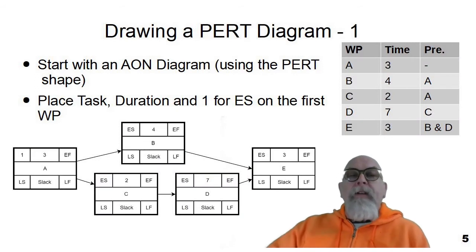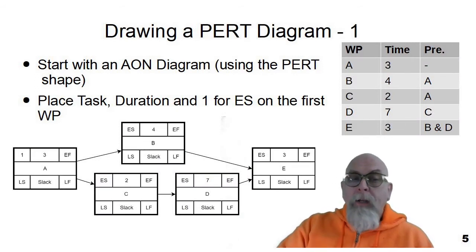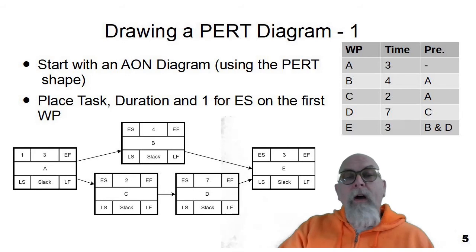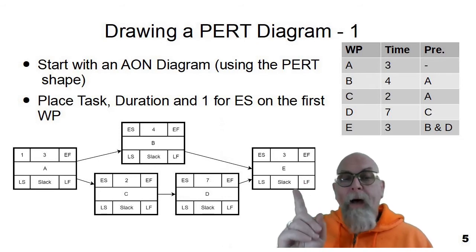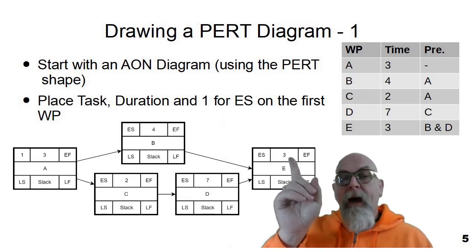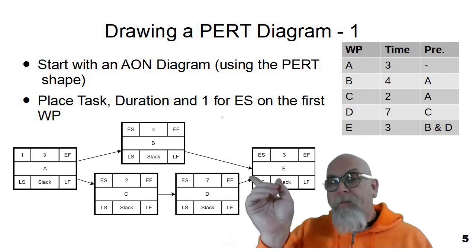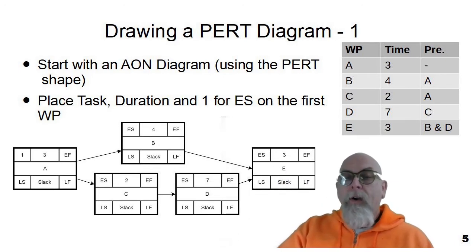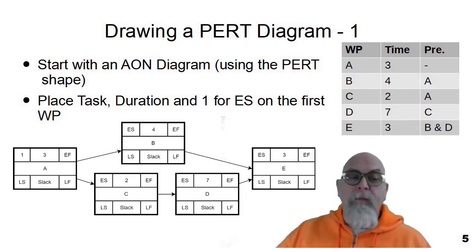So the first step in drawing a PERT diagram is to basically draw an activity on node diagram using the PERT shape, place the task name or task ID, the duration, and one for the early start on the first work package or work packages. So you can see that I put the box here, I put the task name, I put the duration, and on that very first one I put a one for early start. And now we'll go through a second pass to add more information.